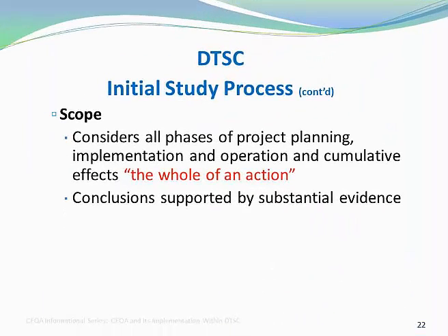The initial study conclusions must be supported by substantial evidence in the record, and that is no speculation, just the facts supported by information. And substantial evidence includes studies, reports, and other verifiable information. The initial study must be prepared before the public agency can carry out or approve the project, and the CEQA process must be completed before project approval.